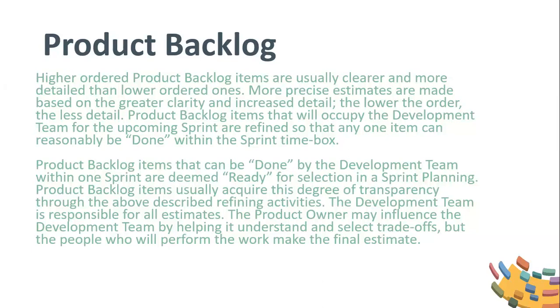The development team is responsible for all estimates. The product owner may influence the development team by helping it understand and select trade-offs, but the people who will perform the work make the final estimate.